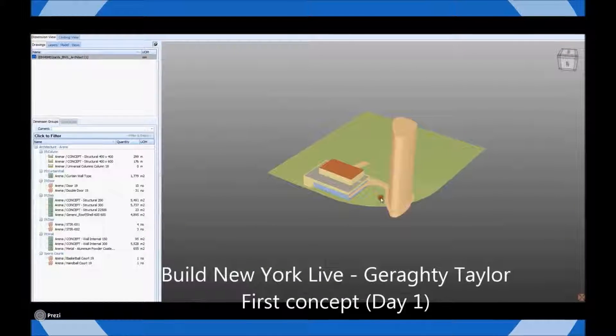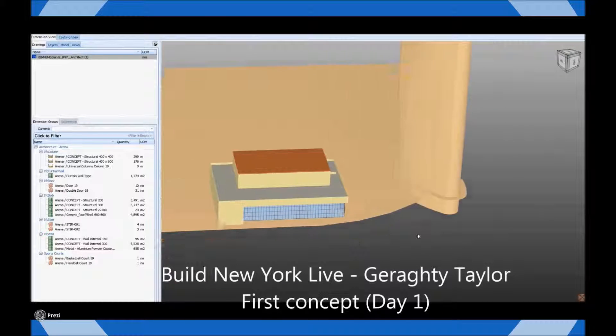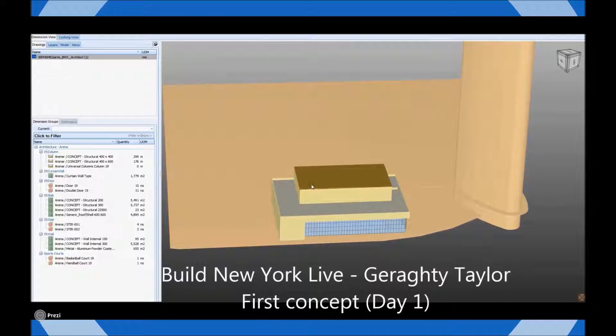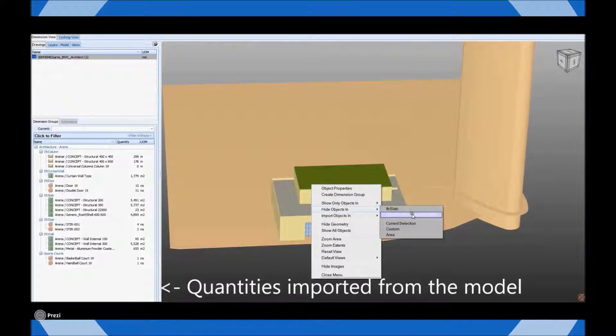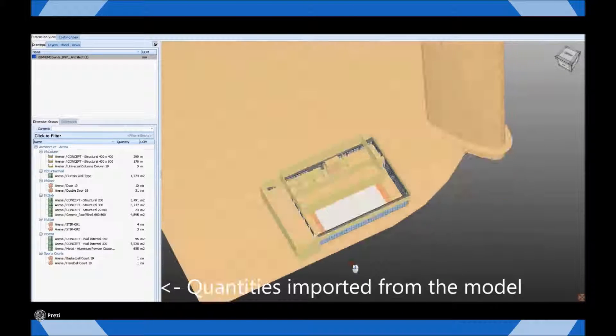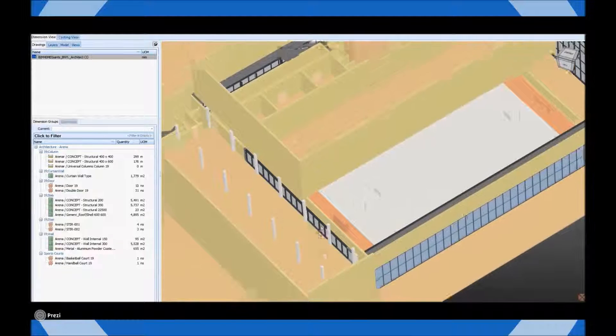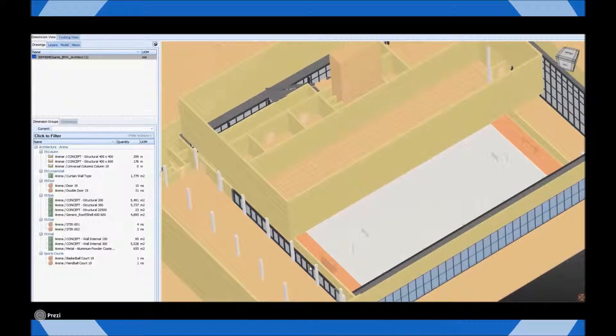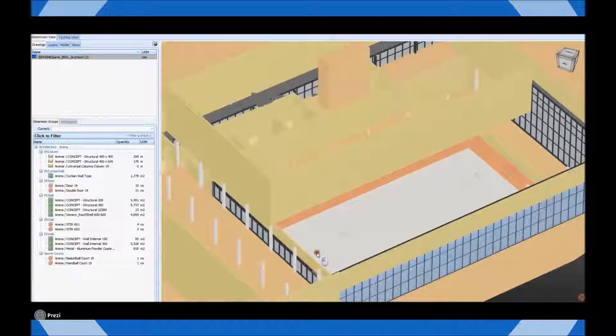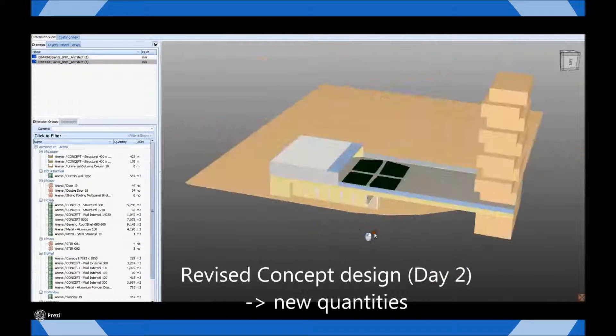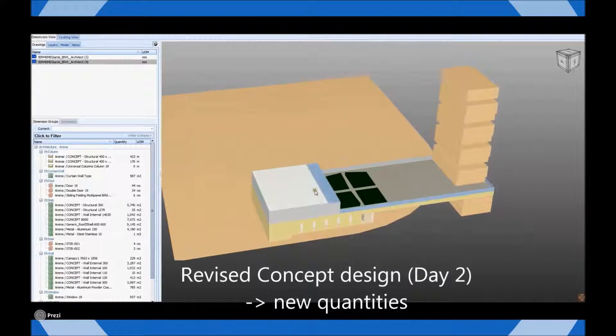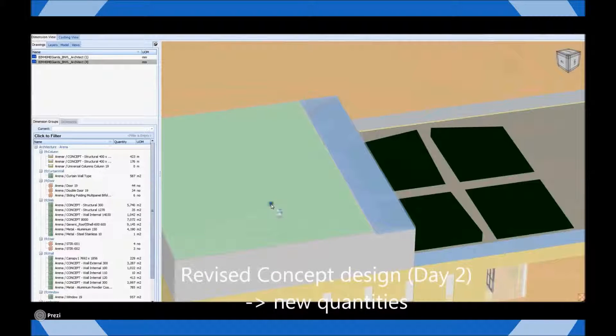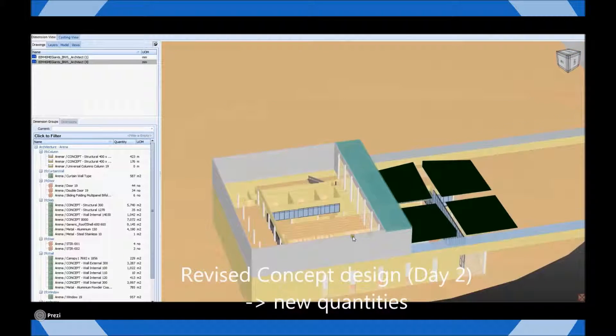Here we have an extract from the recent Build New York Live competition in which project teams had 48 hours to develop a concept design for a residential tower and sports facility. On day 1 a cost estimate is prepared using the available quantities seen here on the left. At the end of day 2 the model has developed significantly including alterations to the internal layout of the sports facility. On the left again we can see that more quantity information is available for use in the cost plan.